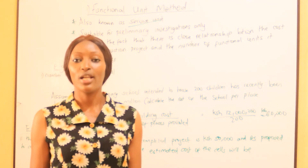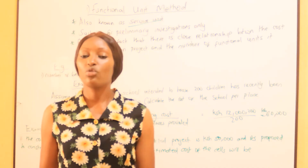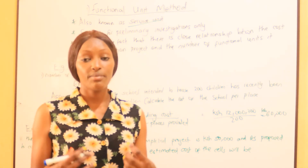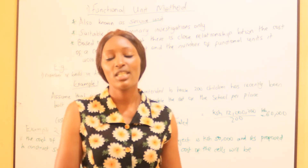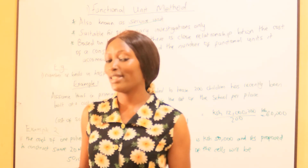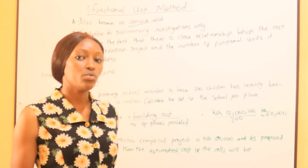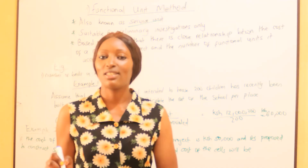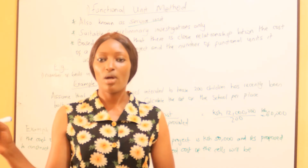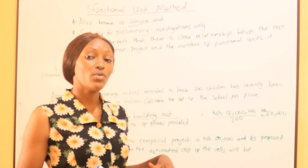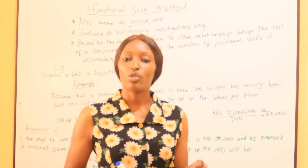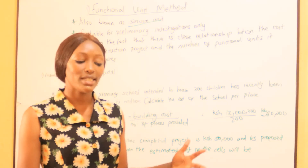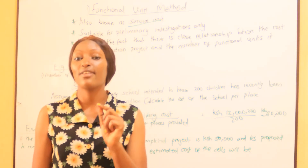For example, a classroom with 20 seats cost 1 million. If we want to build another classroom of the same nature in the same location carrying 40 seats, we take the cost of the 20-seat building — 1 million — and find the cost of one seat: 1 million divided by 20. Then to approximate the 40-seat classroom we take 40 seats and multiply by the cost of one seat. The functional unit method is used in preliminary investigations, when the client has not even started preparing drawings.